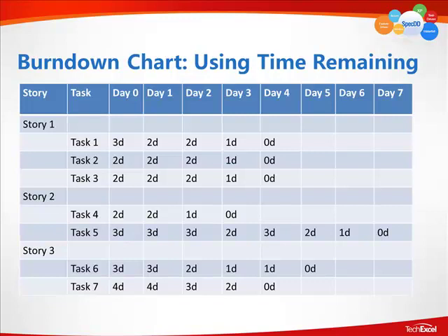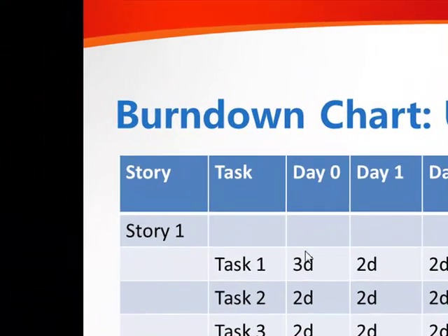Now, for those new people, those inexperienced, the estimation needs to be updated on a daily basis, because as they build their experience, that's how their estimations become worth more. Okay? So from day 0, let's go with an inexperienced person. They go and they estimate 3 days. Okay. On day 1, that should of course go to 2 days. Right? They've spent 1 day on it, so then 2 days remain from the original 3 days.